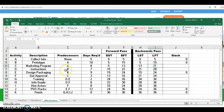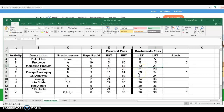Activity C is only a predecessor for F. F starts on day 21, so C can finish on day 21 and, because of the eight-day duration, it can start on day 13. Activity B is a predecessor for D and E; the earliest of the two starts is day 15, so B can finish on day 15 and, because of the 10-day duration, it starts on day 5. For activity A, which is a predecessor for B and C, the earliest start time is day 5, so A must finish on day 5 and starts on day zero because of the five-day duration.